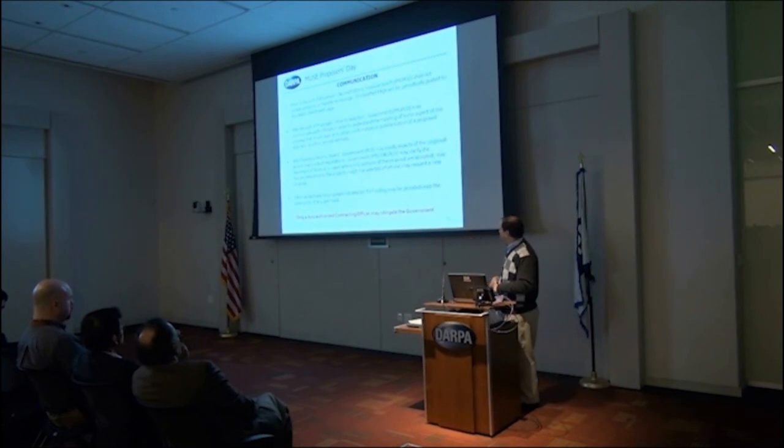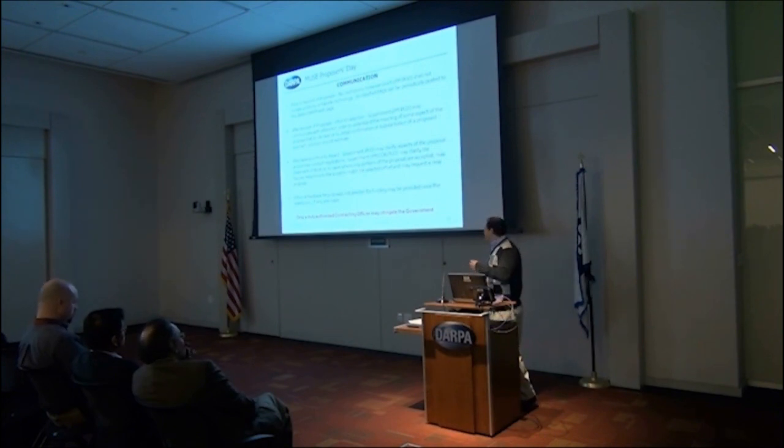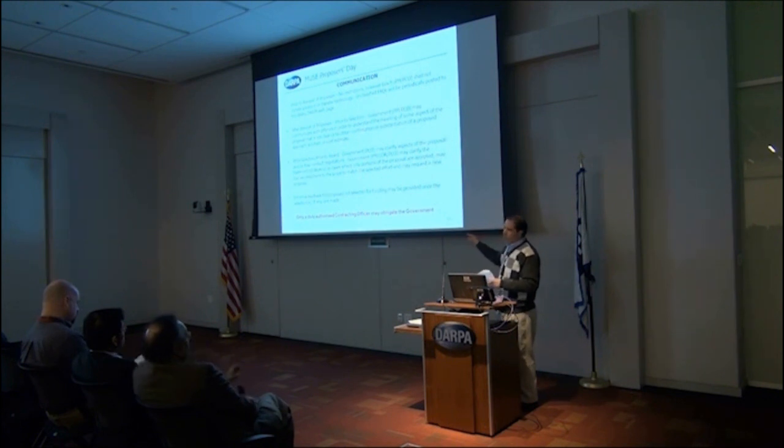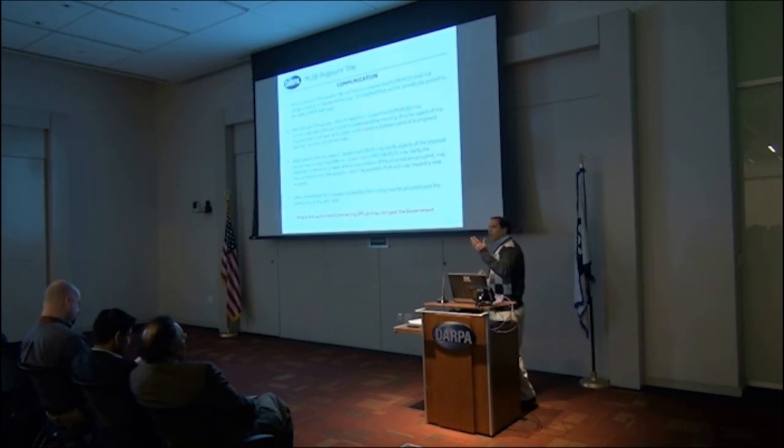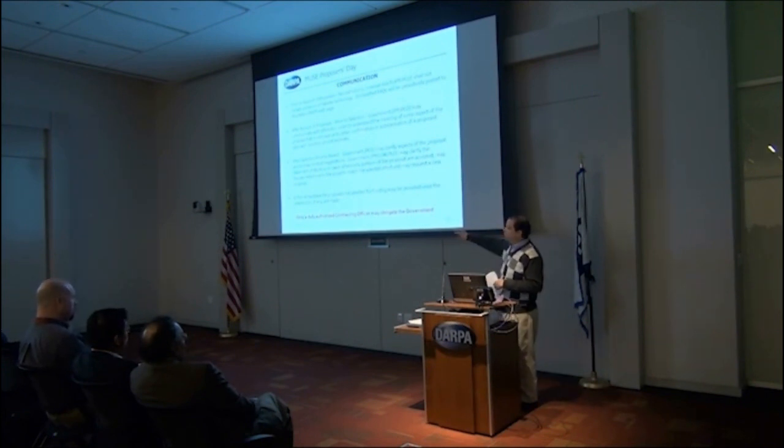The other point is only the contracting officer can obligate the government. So after selection, no matter what conversations you may be privy to between the PM or the Corps or anyone else in the government, you don't act, you don't incur expenses, you don't go off and work unless you are authorized to do so by the contracting officer. Depending on who the contracting officer is, most of us are fairly tightly wound. In my instance, I would have absolutely no mercy on someone who goes off and spends money without authorization. That's your own fault if you do that, and I will not allow you to recover those costs from the resulting contract, and most PCOs will not. So just hold tight when you receive your selection letter, get to the negotiation process, and when you receive your contract, that's when you can start.